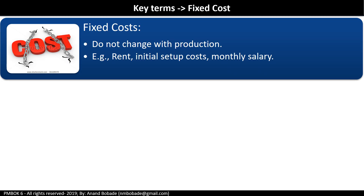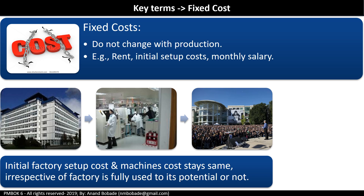Fixed cost does not change with production — for example, rent, initial setup cost, or monthly salary. Consider setting up a mobile manufacturing factory with a target capacity of 1,000 mobiles per day. You will incur the overall factory setup cost and machine cost upfront. This initial setup cost stays the same — or fixed — whether the factory is fully utilized at 1,000 mobiles per day or only producing 500 mobiles per day.